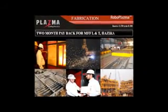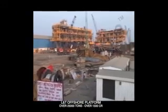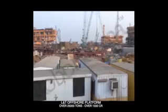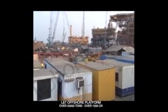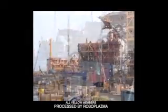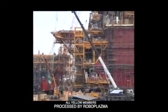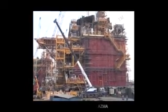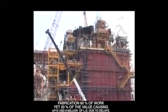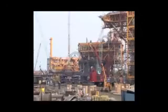L&T Hazira is an example of how globally fabrication needs a transformation to survive. The old thinking was, how could replacing 200 people from a total manpower of 5,500 be significant? Well, the project execution schedule accelerated from 2 months behind to 1 month ahead. Almost $6 million of liquidated damages was saved, enabling a 2-month system payback.